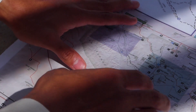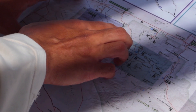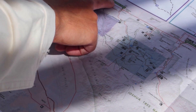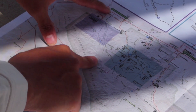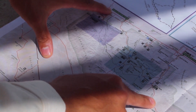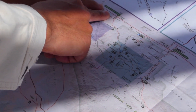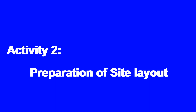You will get the exact location and site boundary information from the site handover document. You need benchmarks for plotting and reserving the entire area of your site. This data is important for the other nine activities to be conducted during the mobilization period.